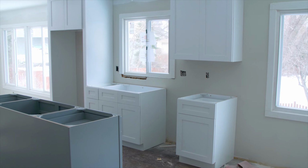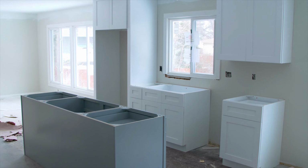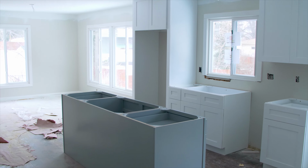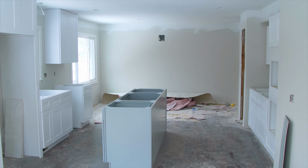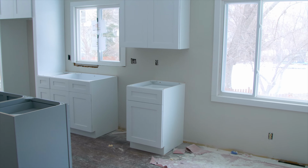How do they eat? Well, we try to get everything done to a point where, basically, you tear out the cabinets, put the new cabinets in, measure for countertops, and that's about 2 weeks of time without water. And then you do all this backsplash and the trim and, you know, around that. But we try to minimize the time without a kitchen to only a couple weeks. But it's hard. Somebody's got 4 kids. Yeah, that's a big deal.